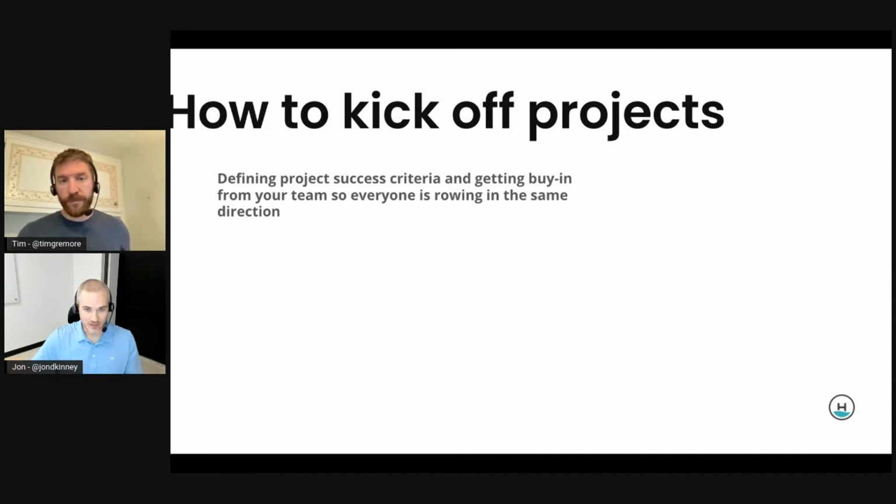What then we have to understand is there's flexible scope. And so we set that stage with the client that in order for this project to be successful, you're not going to get every single feature that you request. But we will end on time and we will end on budget, because typically we'll give a max number. It's not that it's a not to exceed, it's just that with this size team, there's no more way to bill more unless they ask us to work 50-hour weeks or something, which we just don't do.